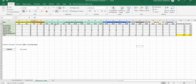Then around ten weeks for construction and unit testing, four weeks for SIT — system and integration testing — then three weeks for UAT support, two weeks for go live preparation and go live, and two weeks for hypercare. Then, to complete this project, we need a few resources, and I have defined the roles here.